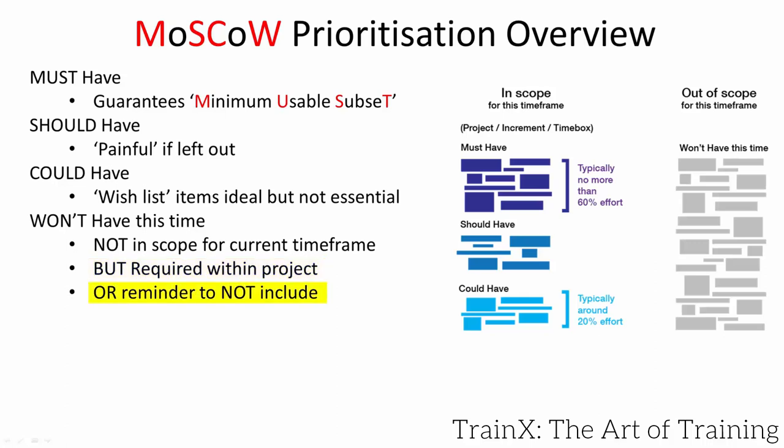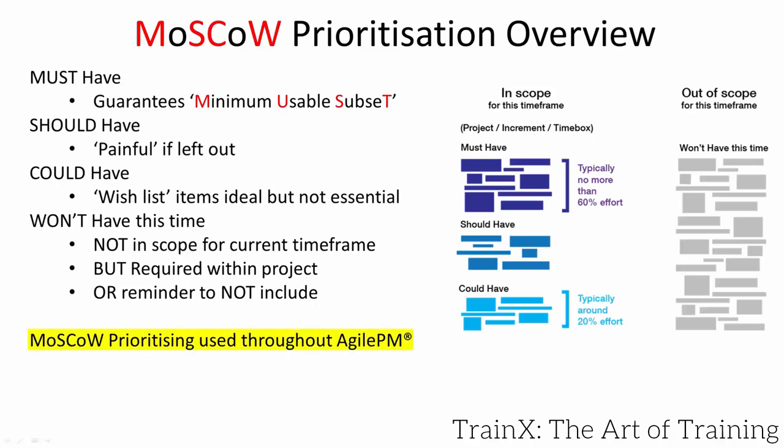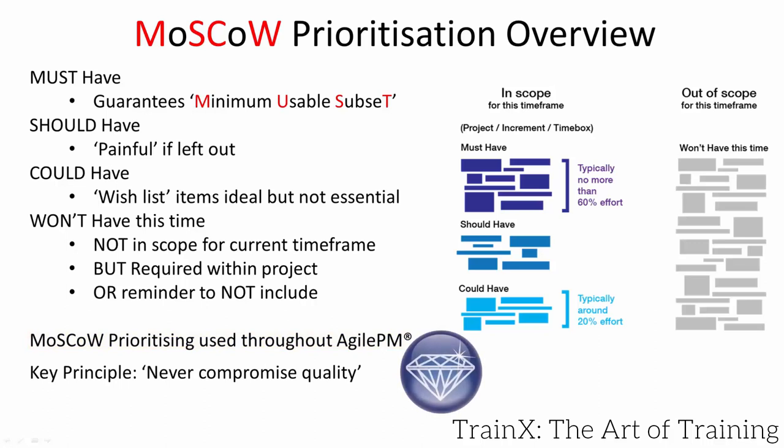MoSCoW priorities have timeframes. For example, our case study's automatic backup could be a could for the in-house version — if not delivered, the IT administrator will manually back up the data. For the commercial version, automatic backup becomes a must, as no one would buy it if their data could just go missing. MoSCoW helps with testing, and so the principle never compromise quality is at play here.